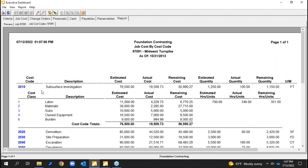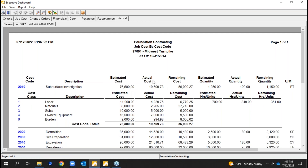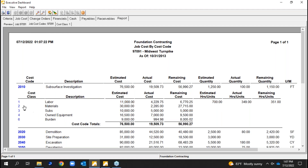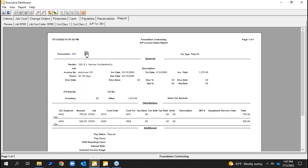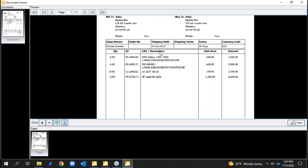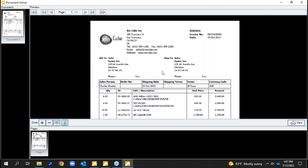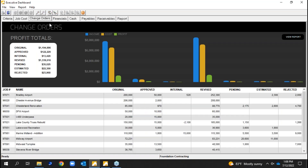About half our clients just do core cost groups, tracking by job total labor, total materials, subcontract costs, and equipment burden from payroll. Even if you use cost codes, you can run reports that show just grand total cost or total labor hours. In this example I'm showing cost codes with the breakdown beneath them — that $19,000 broken down by labor, material, subs, and burden. If you click into labor you'll see backup detail; click into material and you'll see the invoices.